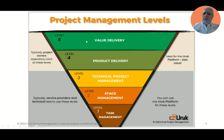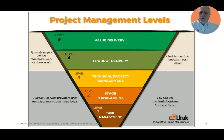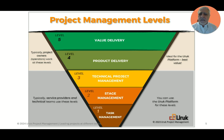Then we have the value delivery model. Value delivery is focusing on delivering value. When I'm delivering the product, I don't know if the product validates the objective of the project. Value delivery focuses on defining the value and anticipated benefit we expect from delivering that product or service. It then goes into initial operation and verifies or validates that what we built is delivering the expected benefit, outcome, and leading to success.